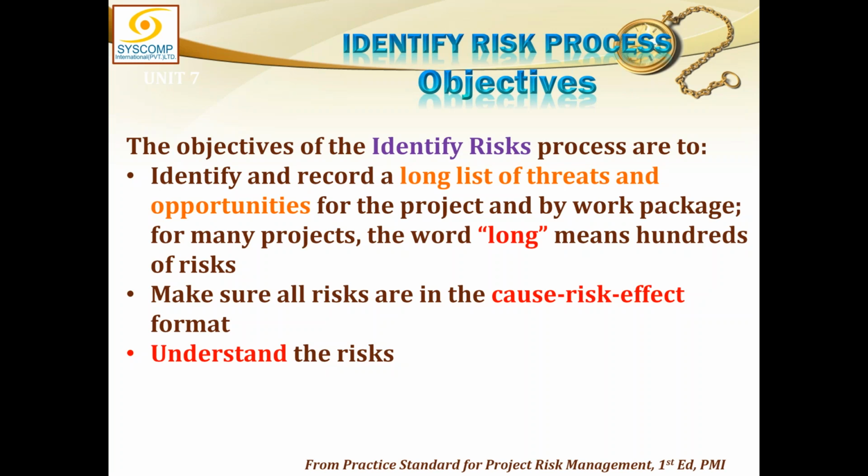So a long list means hundreds of risks, or maybe hundreds of thousands, or maybe millions of risks. It does not matter. That all depends upon how much time is available to you. And as I told you earlier, there are means available by which you can collect this huge number of risks in the shortest possible time. Do not debate each risk. Just keep collecting whatever the other people are saying and keep writing it down. We can debate it later.